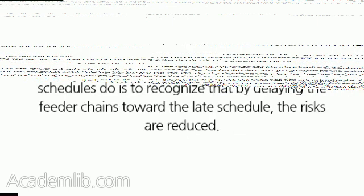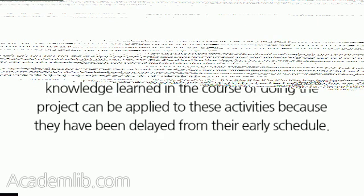One of the important things that critical chain schedules do is to recognize that by delaying the feeder chains toward the late schedule, the risks are reduced. Risks are reduced in the later schedule because knowledge learned in the course of doing the project can be applied to these activities because they have been delayed from their early schedule.